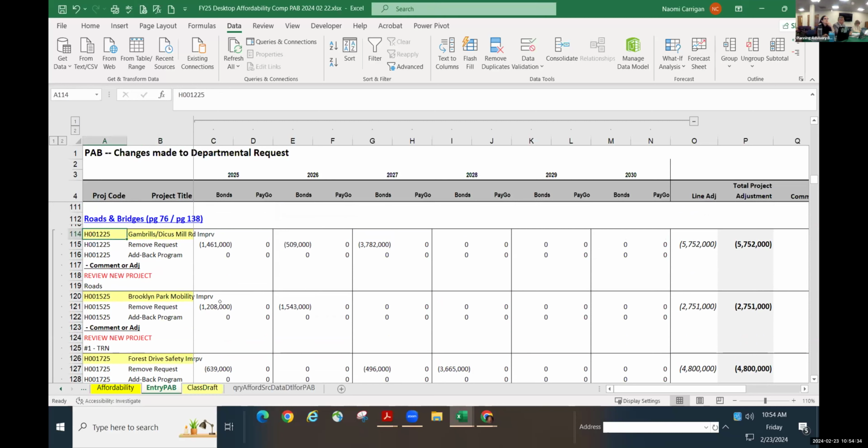take out? So after the multi-year recurring and the new capital projects, we then start to look at existing capital projects that are already in the pipeline, that would be in phases that we could potentially take an out year phase out of the equation and then address that at a later date.